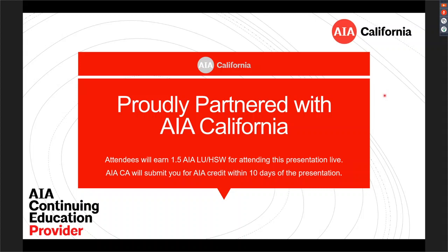Then you have 76 listings. Are they going to be reviewed in 5 minutes? Well, that's the question. So will 86 UL listings be reviewed? No. They're not going to be able to review them. That's going to be an ACD. That's going to throw it into an ACD category. Now, if there's only one listing that was missing and they want to add it, NMA.